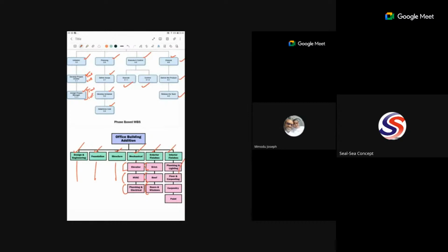Because if a particular task is ambiguous, just imagine you attaching 5 people to a work that will take 10 people to do. And it happens to so many supervisors or project coordinators, because sometimes you look at it that it's like they don't even know how big the task at hand is. So when you are giving the work of 10 people to 5 people to do, you're already calling for failure. Even if they rush to actually deliver, it will affect the quality of the project.